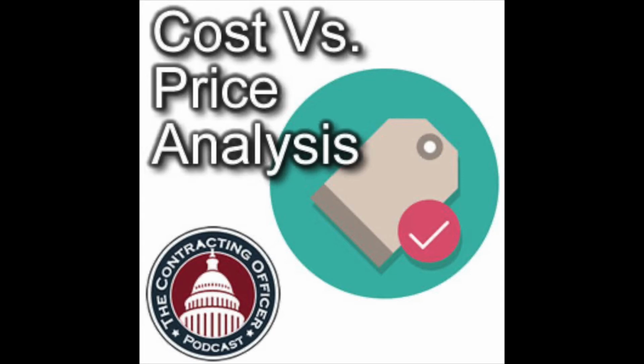It turns out that if you're buying a cargo aircraft, an aircraft to haul stuff around, the dollars per pound of cargo that it can carry is roughly equivalent, whether you're buying a 747 cargo aircraft or a 767 or Airbus, a little plane, a big plane, or a C-5 or a C-130, big Air Force aircraft. It all fits right on a curve. And that really helped us say, this is about what a cargo aircraft should cost. We're still talking price analysis.